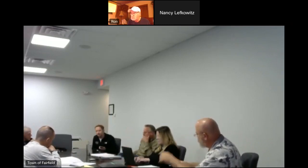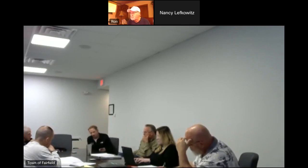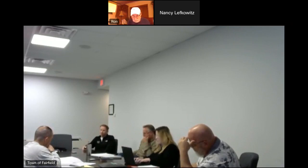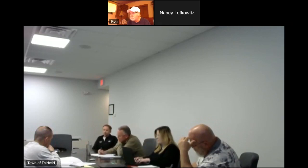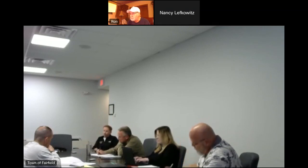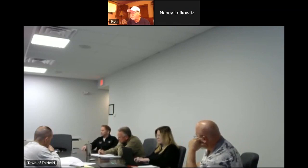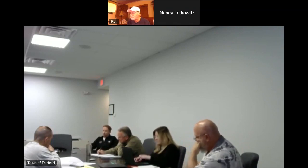Okay, so, like I said during our last meeting, John Marsilio, Tom Bremer, and I have interviewed a couple consulting firms, asked them to prepare scopes on an operational audit or operational assessment, an organizational assessment, and facility condition assessment. So those are the three things that the consulting firms are preparing price and scope for, and all three kind of work together. They provided us scope and fee for the operational and organizational, but didn't include the facility condition assessment piece in their initial proposal.